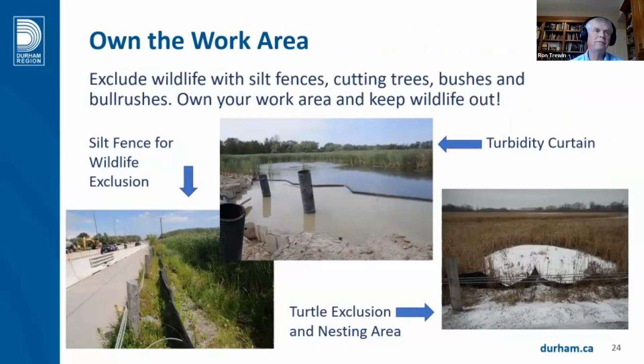First, we put up silt fencing. You see here on the left picture, you see silt fencing. Basically, that was to keep turtles out of our granular shoulders and out of our work area, especially since they like to nest in this area. We also created, you can see on the right side, a nesting area.